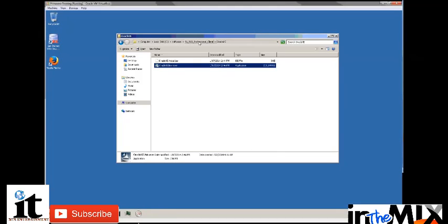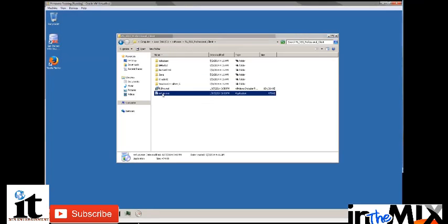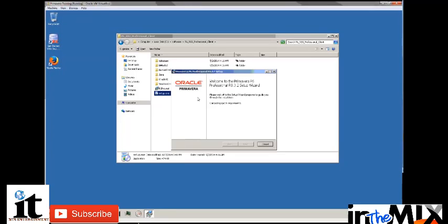Let's now install the P6 Professional client. I'm going to launch the installer through setup.exe. This will check if the environment has the prerequisites installed. These are the HTML, .NET Framework, Java, and Windows Installer. On my system they're already installed, but if they weren't, the installer would install them automatically and then launch the P6 Pro MSI.